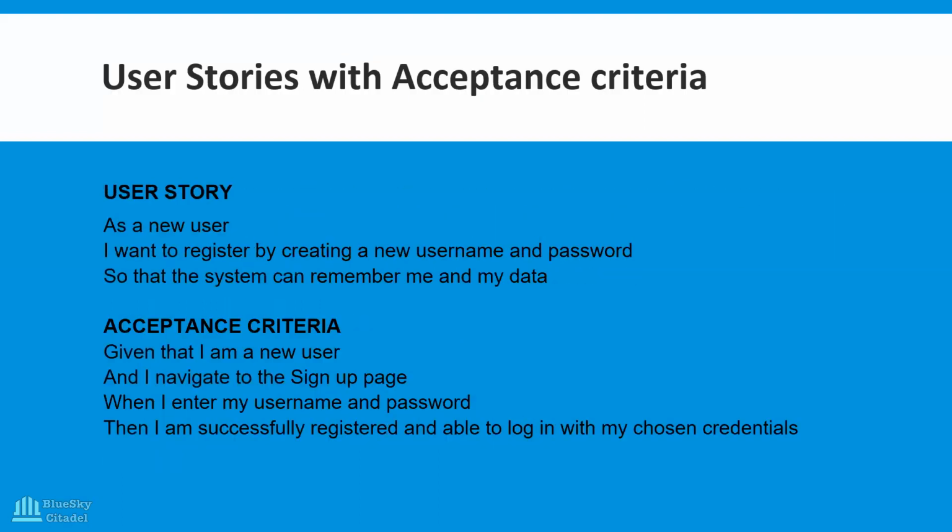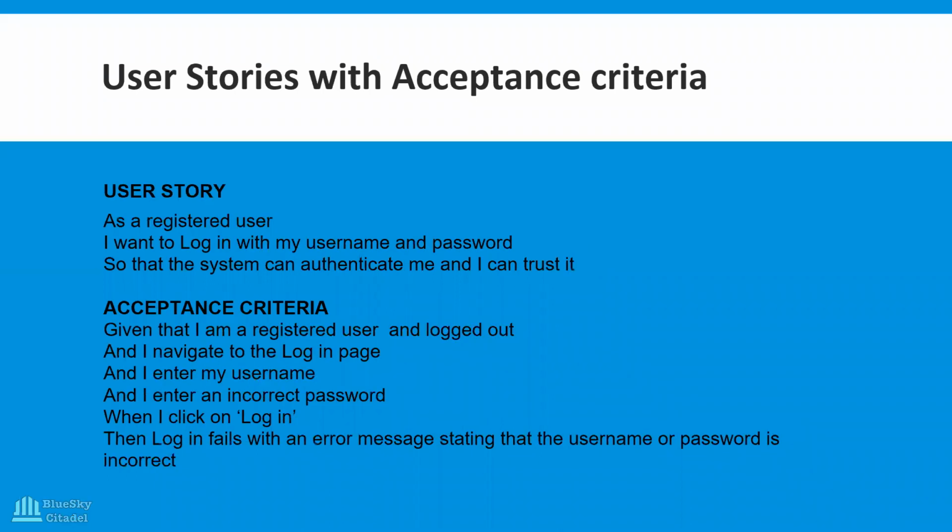So this is what the testers, when we talk about developers and testers and making their life easy, this is what they work with. Even as business analysts, you might find that in the course of your project, they might ask you to do UAT, which means user acceptance testing. This is what you'll be working your way through, to see if everything has been developed correctly and if the system or the process is responding as it should.